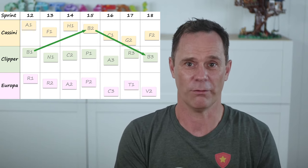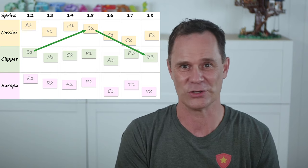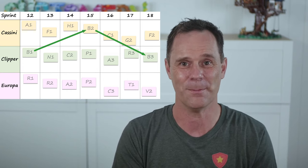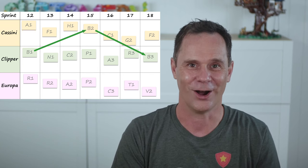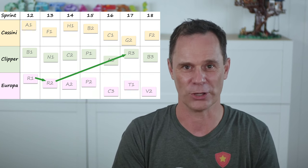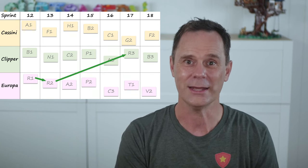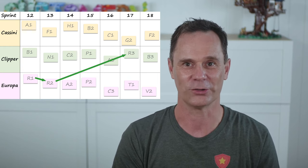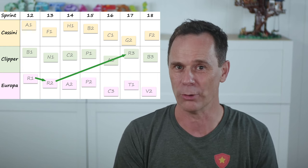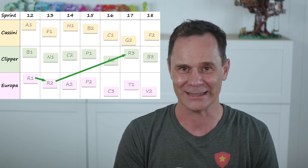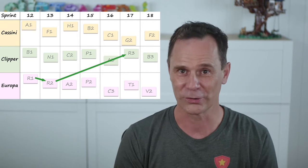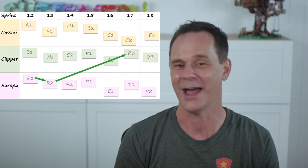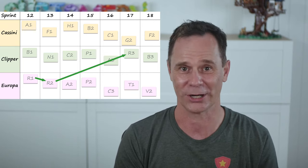There's a buffer of two sprints between the features in set B — longer arrows are even better. R2 is dependent upon Europa completing R1 immediately prior. Short horizontal arrows indicate there's no wiggle room here, but at least R1 and R2 are both within Europa's control and they're not dependent upon another team.